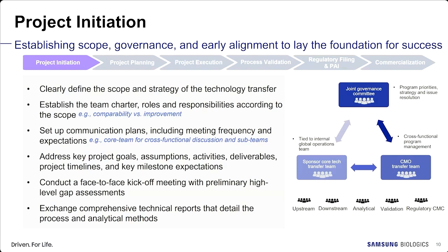Identifying high-level gaps on the raw materials and process is required before the kickoff meeting, or to discuss the risk and mitigation action during the meeting, so that the team could start the mitigation action earlier that could affect the overall technology transfer timeline. Through this stage, exchange of comprehensive technical reports that detail the process and analytical methods are studied.